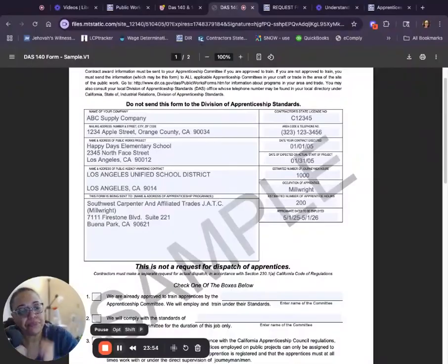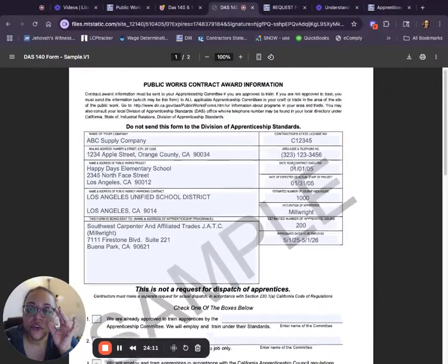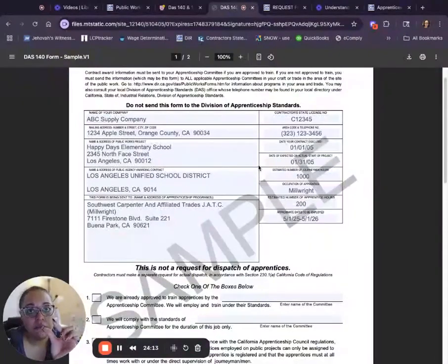Part 6, deadlines and penalties. Okay, so the 140, this one that we're looking at, must be submitted within 10 days of contract award, no later than the first day on the project. So your timeline is very small.